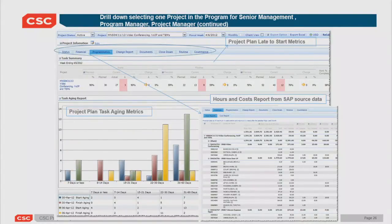On what level did you try to map that SAP data to the project? By person. So we captured the hours coming into the SAP system by person, so that we could tell if a guy was supposed to work. You can see this detail here. I've got financials, cost and price information, and then I've got hours information. So I bring it all in. And the reason that's important is if I've got resources that are working against the schedule, I've got X number of hours that we've planned for him to work, and then I'm able to see what he's actually logged in SAP, and I'm able to keep it accurate.